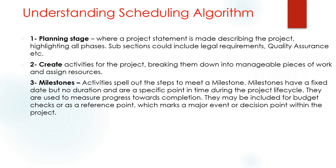Create activities. Activities means smaller pieces of work. When you divide your WBS — for example, foundations — you divide it into formwork, placing rebars, steel, and pouring concrete. These are called activities, or tasks.